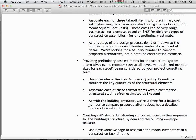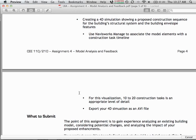The final task for the construction manager is to produce a 4D simulation. Put together a task timeline for construction of the structure and envelope: place foundations, columns, beams, floors to build the skeleton, then add exterior walls, glazing, and roof. That's as far as you have to go — no need to detail interior pieces. We're looking for roughly 10 to 20 construction tasks at a level like: columns on level 1, beams on level 1, joists on level 1, floor, then columns on level 2. Think through the appropriate sequencing, then map that to model elements to create the 4D simulation.